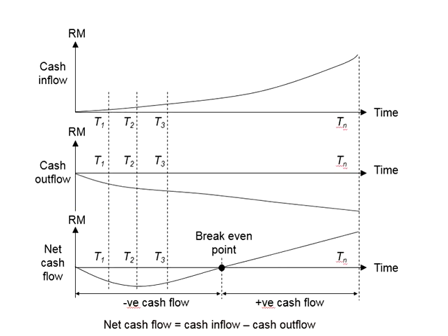Normally, we expect that at the early stage of the project there will be negative cash flow until, at a certain stage, there is a break-even point. And from the break-even point onwards, most likely your cash flow will be positive. Now, before reaching the break-even point here, you will find you do not have sufficient funds to finance the project activities.